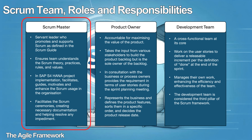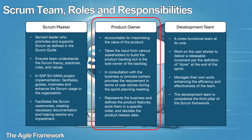The key responsibilities of a Scrum master in the SAP S/4HANA project implementation are to facilitate, guide, motivate, and enhance Scrum usage in the organization. The Scrum master is responsible for arranging and facilitating the Scrum ceremonies, creating necessary documentation, and helping resolve any impediments. The product owner role is accountable for maximizing the value of the product. The product owner can take input from various stakeholders to build the product backlog but is the sole owner of the backlog. The product backlog cannot be changed by anyone except the product owner, with the exception that this responsibility is delegated to the development team. In a traditional SAP implementation project, the business owners or process owners provide the requirements. The product owner, in consultation with the business or process owners, provides the requirements in terms of user stories during the sprint planning meeting. The user story is further clarified if the need arises by the product owner with the necessary support from the business or process owner.